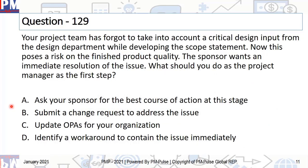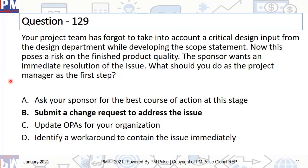Let's move on to question 139. The answer is to submit a change request. A change request can come because of any reason — it does not always have to come from the customer. It can come from forgetting something, so your team itself can actually put in the change request. The moment you come to know about any discrepancy, the first thing you need to do is submit a change request. We missed something — then it goes to the CCB, and they will figure out whether we have to do it right now, and take a decision.